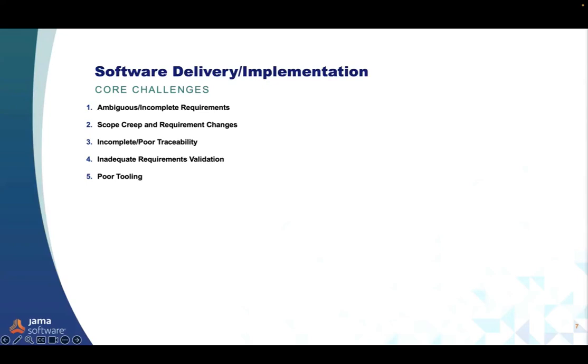Well, scope creep and requirement changes can disrupt project management processes established during planning phases. Initially defined project scope and objectives may expand incrementally as stakeholders identify new opportunities or refine existing requirements. Without effective change control processes in place, these adjustments can lead to project delays, resource overruns, and increased project complexity.